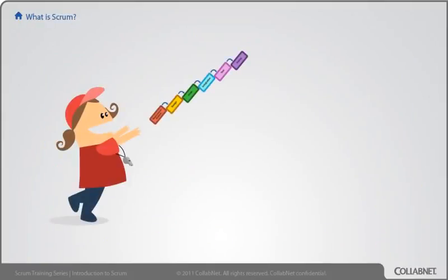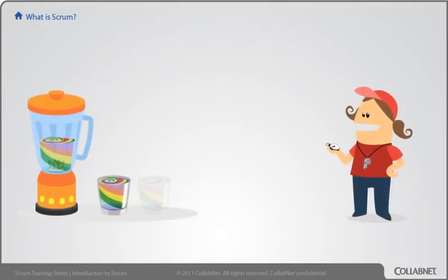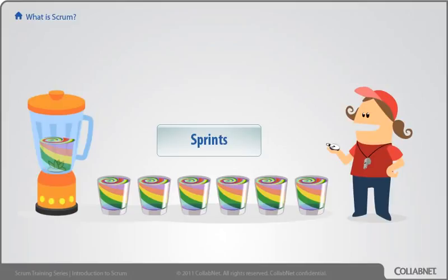Scrum throws all those phases in the blender. All the ingredients are mixed into every sprint. Instead of dividing the work into activity-specific phases, we divide it into fixed-length iterations called sprints. Every sprint contains some combination of analysis, design, actual implementation, testing, planning for the future. Maybe we'll actually be shipping or deploying more frequently.